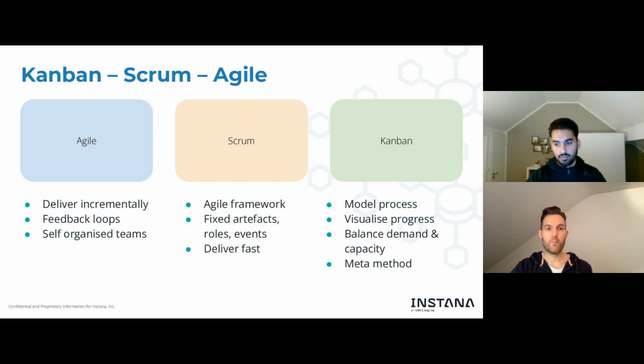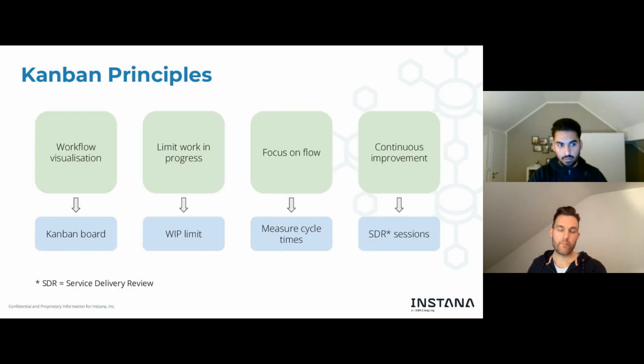So at one point in time, we needed to balance this and move away from this push method Daljit described. Like, hey, here's a new field request, which is our terminology for a bug or a question customers might have. Please, engineering department, please solve it now, because it just appeared now. Coming to a pull model where we as an engineering department can decide, okay, now is the right time to pick the next item and start working on it.